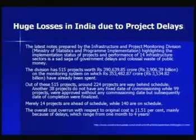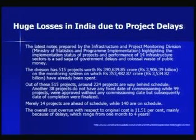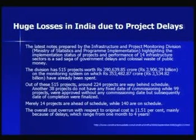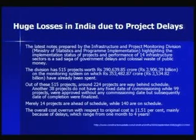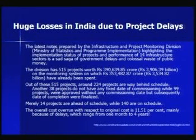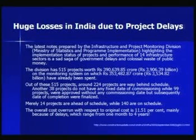There are huge losses. The government has an agency that tracks big infrastructure projects in the country, and they have been tracking 515 projects in implementation involving 3,90,000 crores of money invested. Out of these, 224 projects are behind schedule and only 14 projects are on schedule out of 515. Projects running over time and over cost is so common, and there is a lot of money wasted in the process — a huge drain on the country's meager resources.